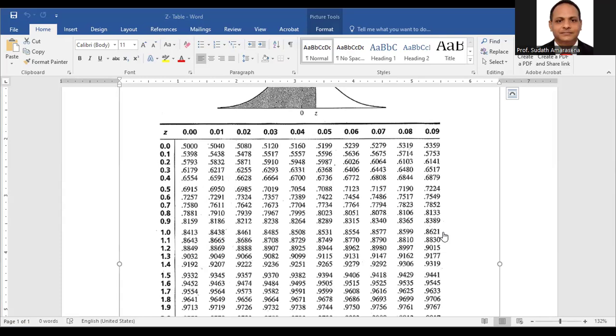The probability value is 86%. Right? Because expected time is 23, and the question asked 25, then we have a higher probability. Right? That's the way we are going to use the Z table to say the probability value.